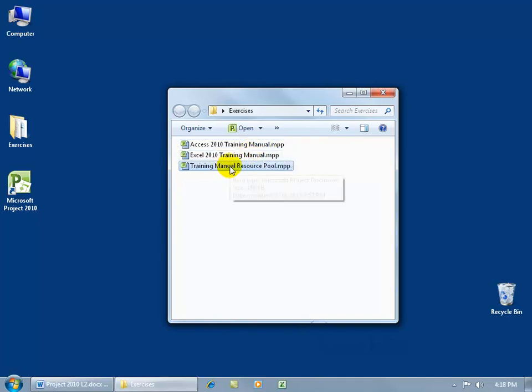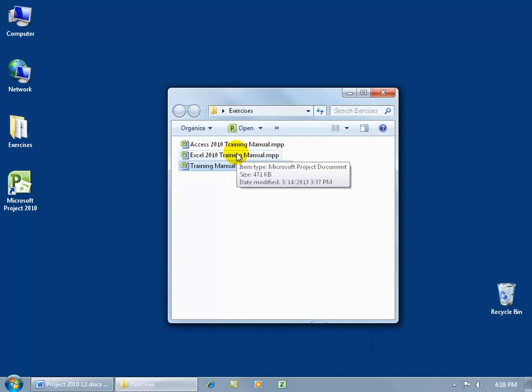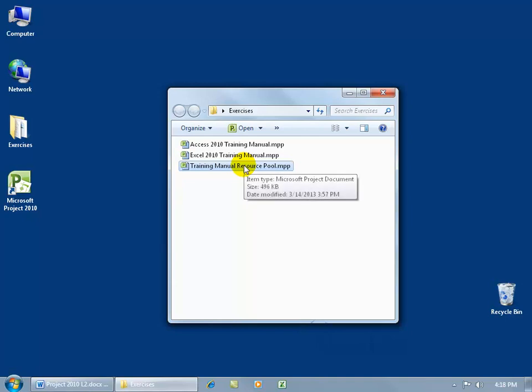So we can pull all our resources into one file and share those, linked to multiple project files. Having a resource pool eliminates the need for project managers to re-enter resources and keeps the sharer files centralized and consistent as a current source of resource information, thus helping prevent over-allocation.